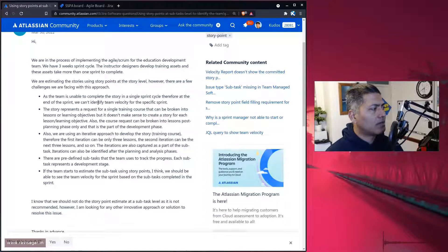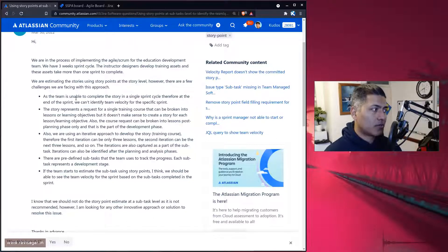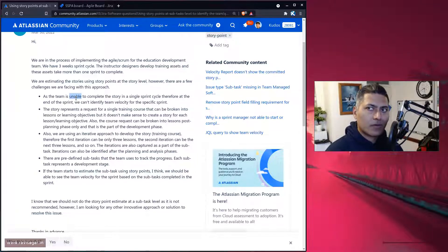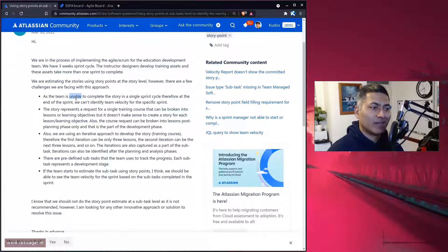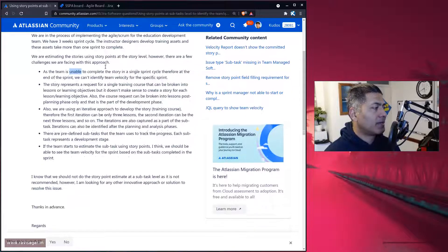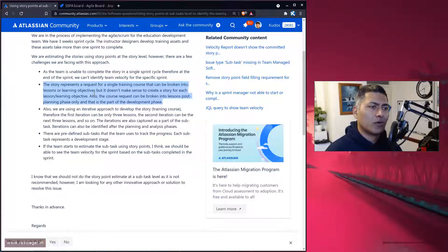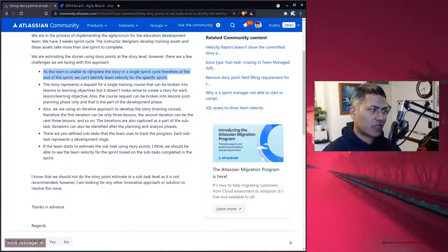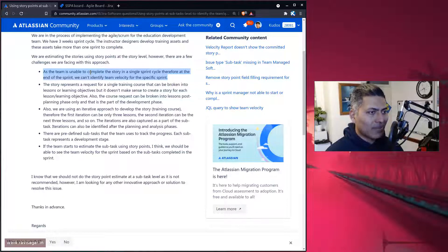What this question tells us is: number one, the team is not able to complete the story in a single sprint. For example, you have a story with 20 subtasks and you completed probably five of them but not the remaining ones — causing a spillover. Sharad also mentions that the story represents a single training course, making it difficult to break it up further.